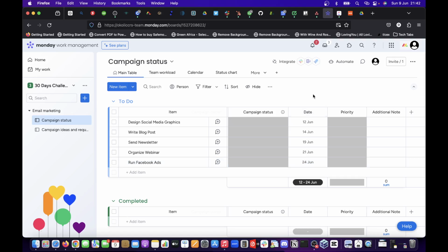Now, if you notice, the moment I set these due dates, under here is the summation of the dates. It says that this task starts from 12th. Automatically it is going to appear there, which tells you that this task is supposed to start on 12th and end on 24th. That is what we are seeing here, 12th to 24th, on that black place, this particular place here.